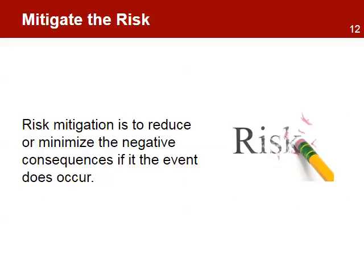Mitigate or transfer the risk is for those risks that have a medium level of probability and impact. Here, the goal is to reduce the impact of the risk on the project. The project team will identify actions to reduce the impact by changing some parameters in the project or by developing alternatives or contingency plans in case the risk event does occur. The cost and effort of actions to mitigate the risk should not be higher than the cost of the risk impact on the project. For example, a probability of delays in transportation of equipment can be mitigated by creating purchase orders much earlier than originally planned.